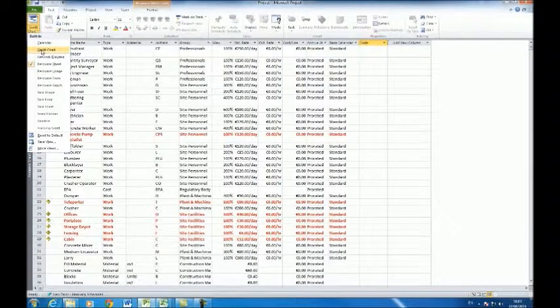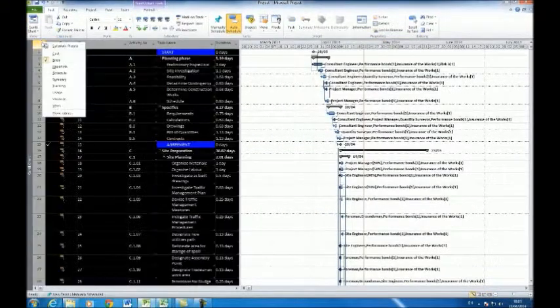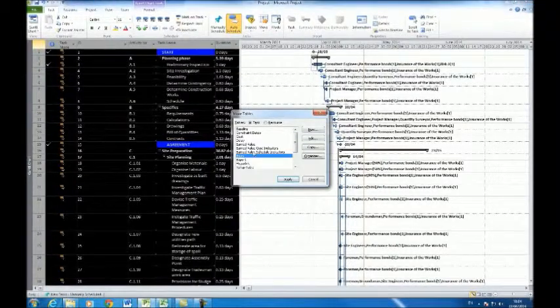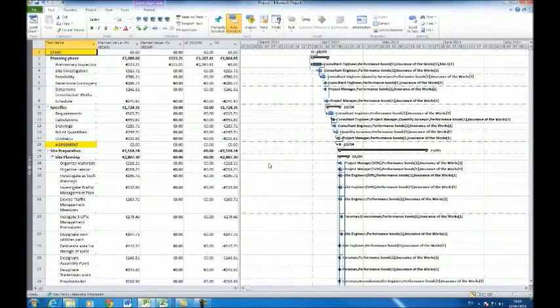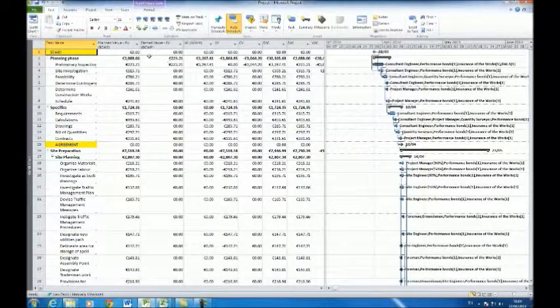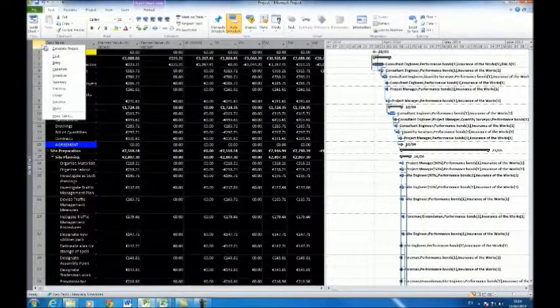To perform EVM, go to Project, go to Task, click on Gantt Chart and select Gantt Chart from the drop-down menu. Right-click on the top left corner of the screen, and select More Tables at the bottom of the drop-down menu. Select Earned Value from the dialog box and click Apply to display the values. Here, the user can look at things like planned value, actual cost, earned value as well as cost and schedule variance. This concludes the software package for the contractor.